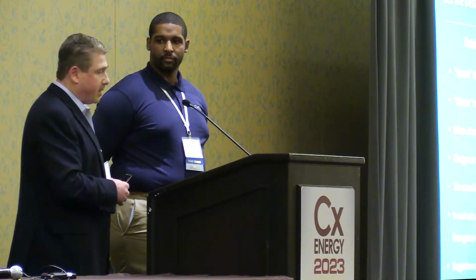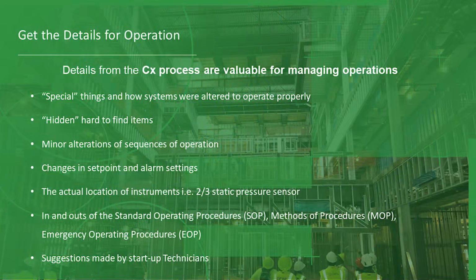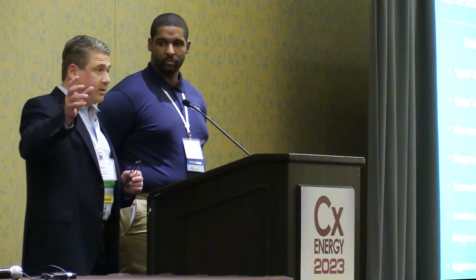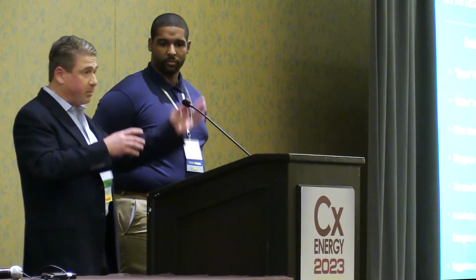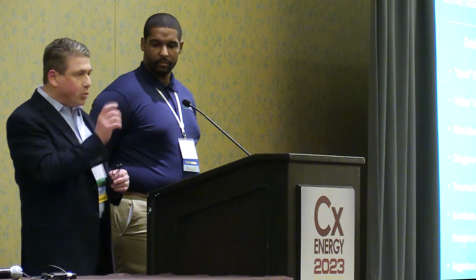I'll give you an example. Commissioning of a BSL-3 facility, trying to set the pressurization, making sure that the room always stays positive or neutral for a period of time. My experience on a project required replacing a Phoenix valve with a different actuator, a faster acting actuator on supply than exhaust. So if a fault occurs, the room still maintains neutral pressure. That information is super critical.